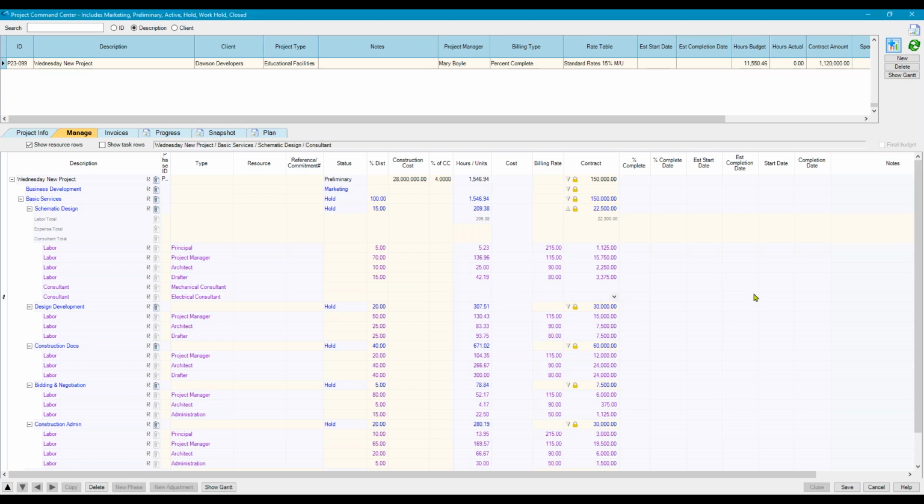Let's say you didn't want the markup, so you're going to charge $1,500 for them. Because my rate table on this phase has a markup, it's going to back the cost down, which means then when you're entering vendor invoices, you're not going to get an accurate verification. So a separate phase with a non-markup rate table would really be what I would recommend for that.